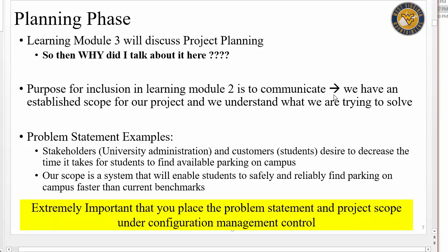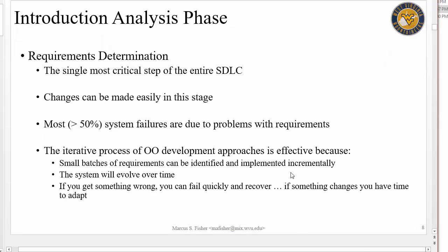In doing that, we need to document what the scope is so we can control it through configuration management — we don't want it changing haphazardly. Remember scope creep from Learning Module 1. Can it change? Of course. But we want to manage that change and put it under configuration management control — we'll talk about that in Learning Module 7 or 8. So we've exited the planning phase, we understand our problem and scope, and we're starting the Analysis Phase.